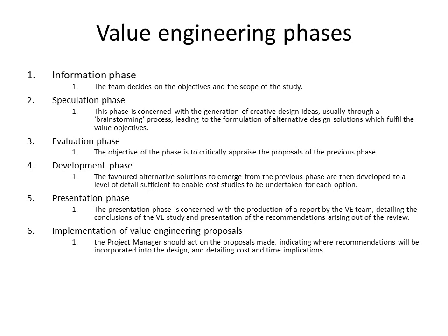So often in engineering construction contracts, value engineering will be carried out, but it is carried out at the design stage. Usually value analysis is not carried out because until the project is finished you can't really assess where you spent too much, and you may never repeat the project to take cost out. So it tends to be more value engineering on buildings than value analysis.